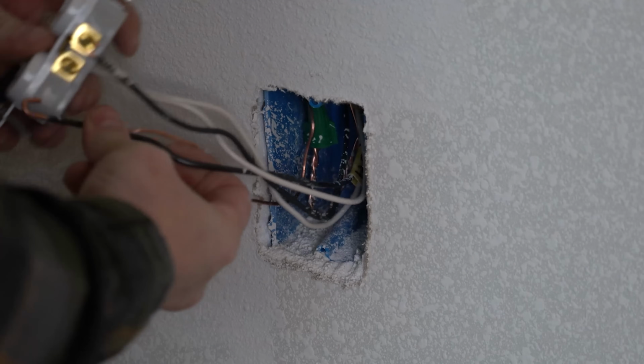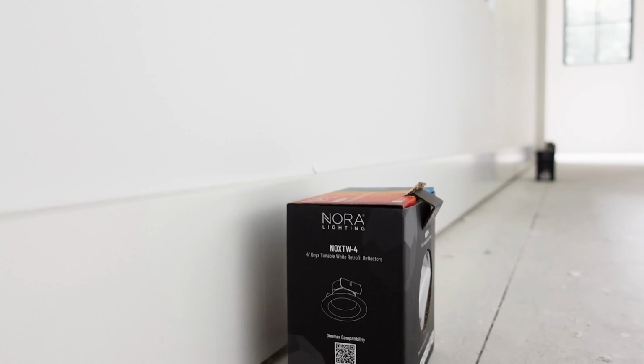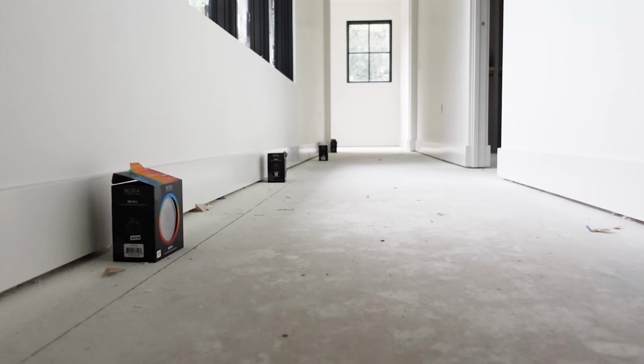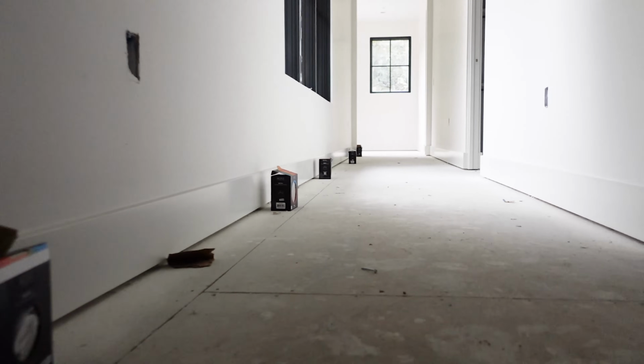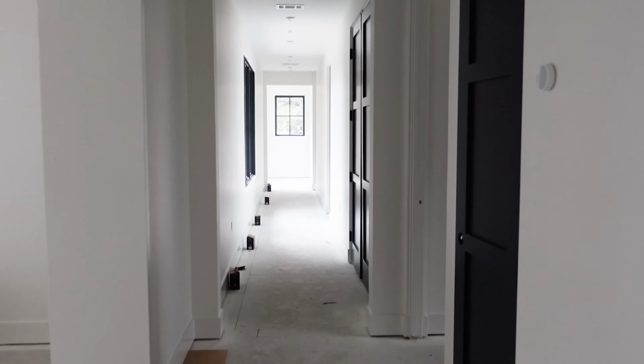So the trim out phase is the last section, or the last segment of construction, and that's when we will take all of our actual devices, we'll bring boxes full of materials. We've got receptacles, light switches, recessed can trims, our panels and all of our breakers, our service, everything that we're going to trim out, and every outlet box everywhere gets a device, and we're actually putting the trims in for everything. That's why they call it trim out.